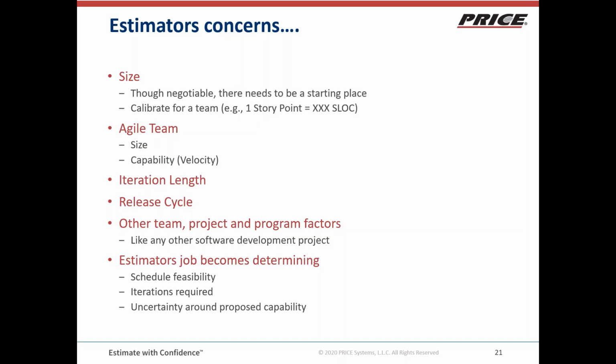And teams collect metrics, and over time, because what happens with story points is, when you first spin up an Agile project, the team has to come up with, okay, what is the story point going to mean to us? At the beginning, it's hard because everybody's ideas are different, but the team gets into sync and in general gets really good at figuring out that that user story is 15 points and that user story is 30 points. They get good at it and reach a cadence where that becomes a natural part of the thought process.